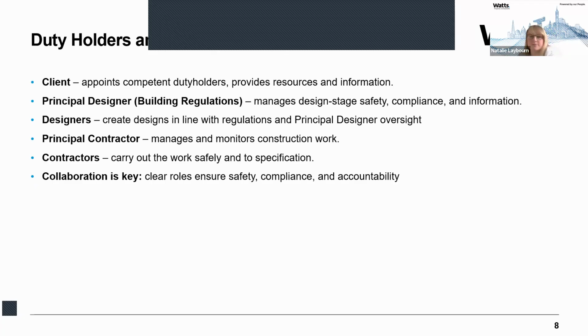So we've covered why the principal designer building role exists and when it's required. I just want to go through the duty holders under the regulations. Under the Building Safety Act 2022 and the supporting regulations, each project has defined duty holders, and these are set out in Part 2A of the Building Regulations 2010. Each duty holder does have specific legal responsibilities. So we have the client. They are a key legal duty holder, and they must appoint competent duty holders, which does include the principal designer, and they must provide the necessary resources and information to support safe and compliant building work.